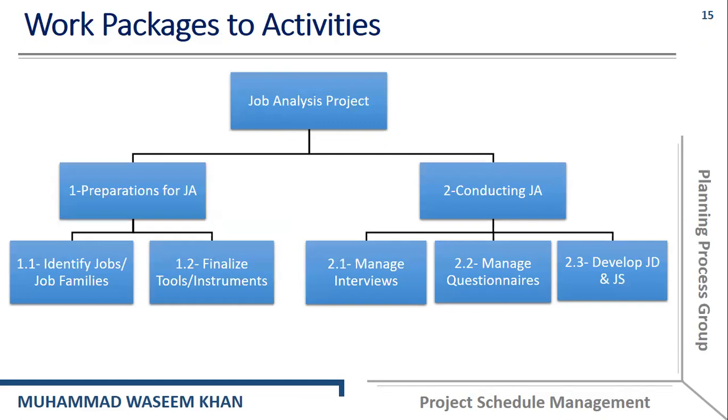This is another example of work packages, showing how we can decompose work into different parts. Job analysis project is one of the projects, and we have divided it into preparation for job analysis and conducting job analysis. Preparation for job analysis is further divided into identifying the job or job families and finalizing the tools or instruments.